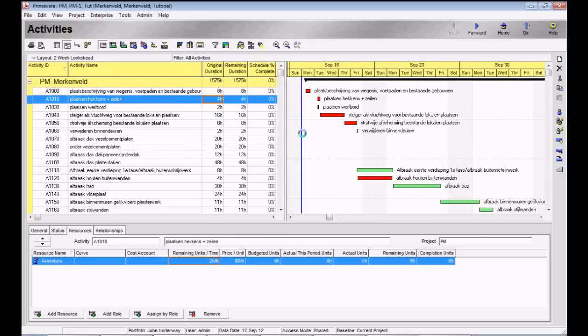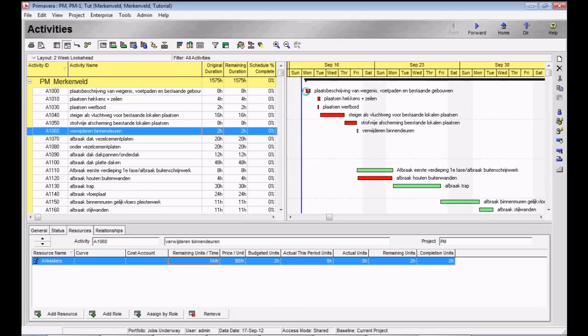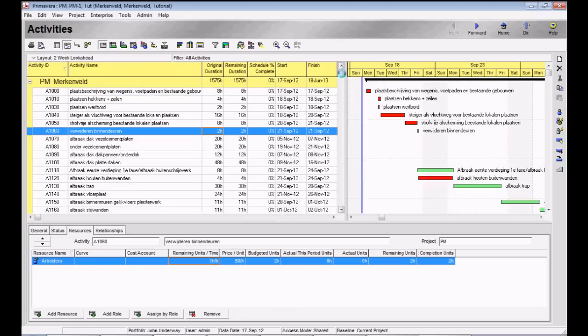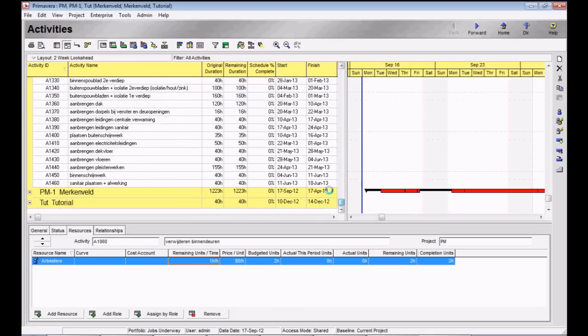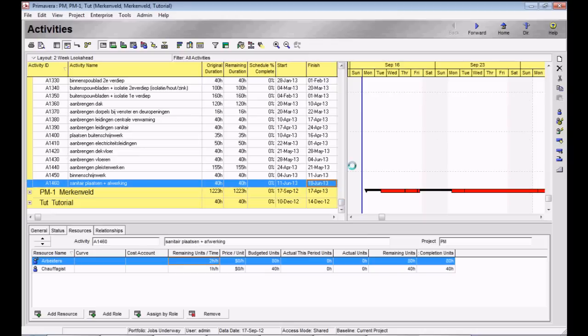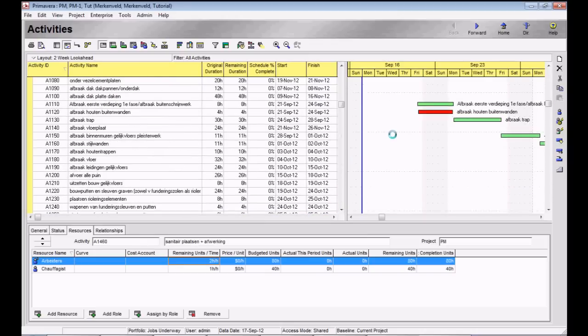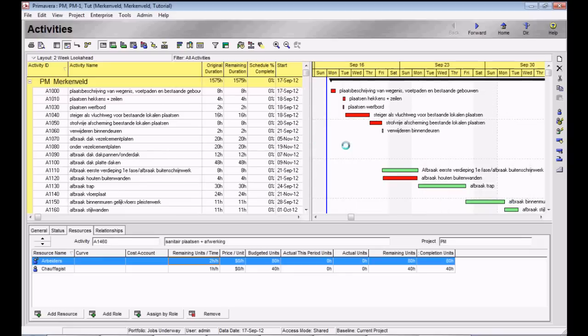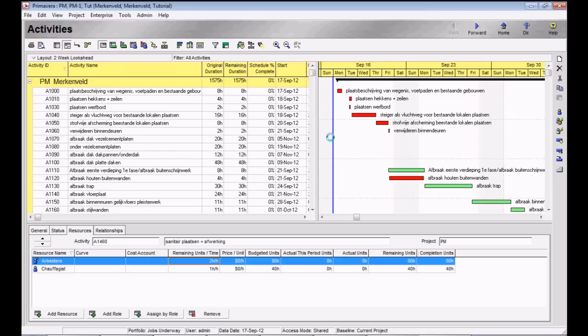After leveling, you will see that your Gantt chart has moved. First we had a finish date of 17 April, but now, as you can see, it has moved to the 18th of June. That's because the resources are allocated to each activity. And if we for instance only have 4 employees available, and one parallel activity needs 4 and the other one also needs 4, it is going to put them in series. So this is the basics you need to know to make a resource constrained project.